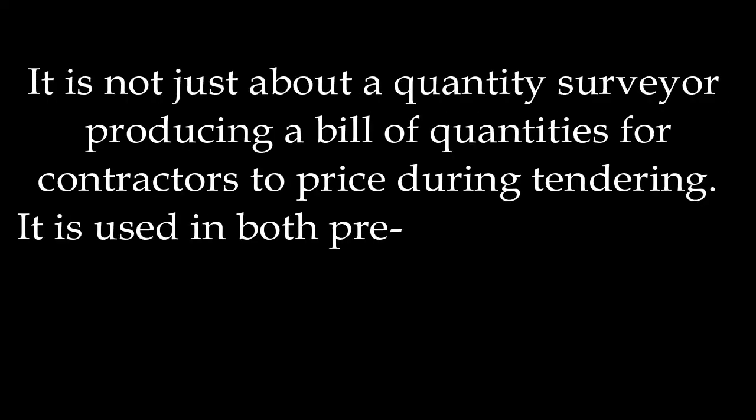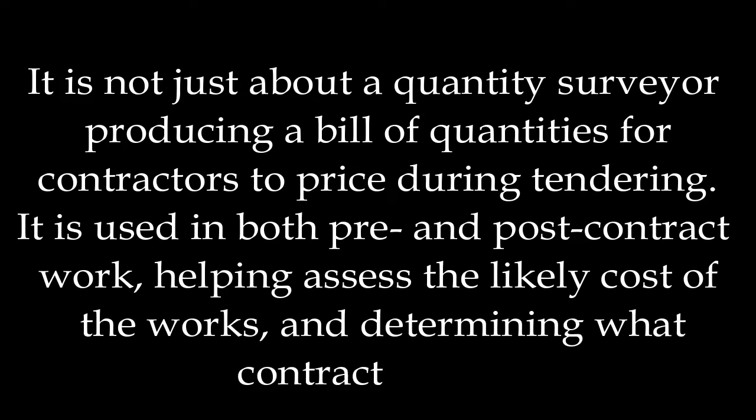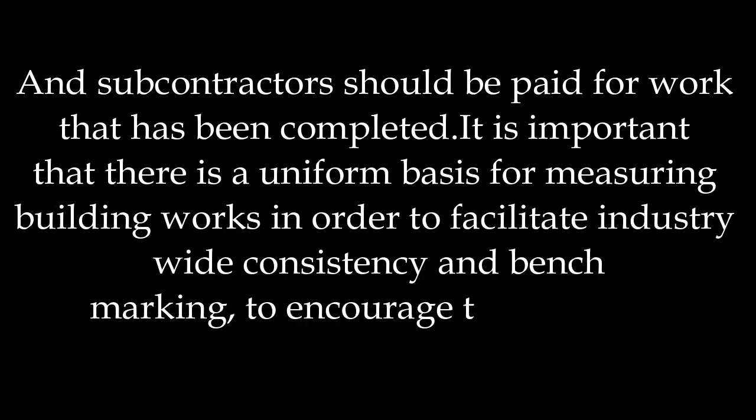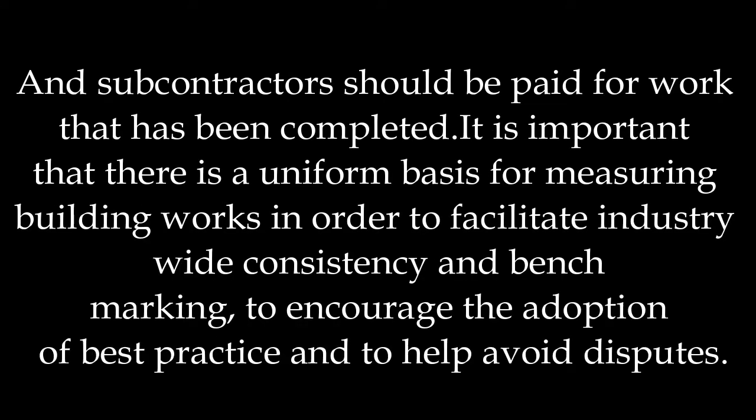It is not just about a quantity surveyor producing a bill of quantities for contractors to price during tendering. It is used in both pre- and post-contract work, helping assess the likely cost of the works, and determining what contractors and subcontractors should be paid for work that has been completed.